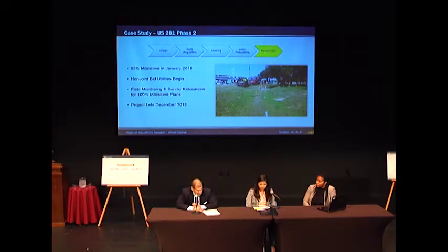So what that'll do is it's going to allow the contractor to bid the project in the true existing conditions at the time that it goes to bidding, with all of the overhead utilities basically adjusted. And again, the project will be letting in December of 18. Anna, did you want to expand on that?